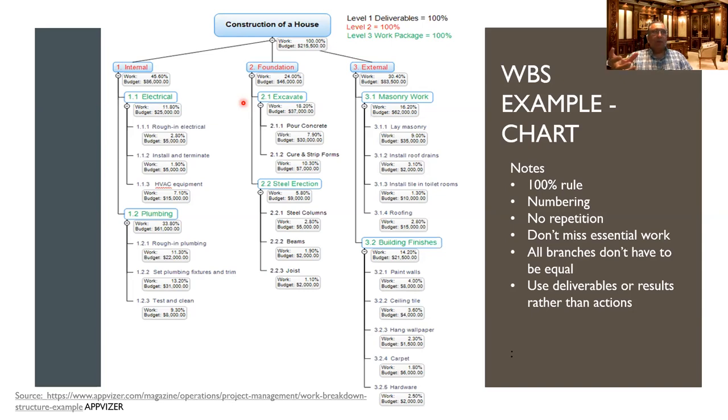So that is one, we call it a work package. Anything that you can assign to one group is called a work package. Example here is this. Another example is steel erection. Or if here you saw there, you're mainly using wooden beams. If it is a wooden structure, or you're using chipboard, drywall, that is your erection of the walls and the shell of the house.